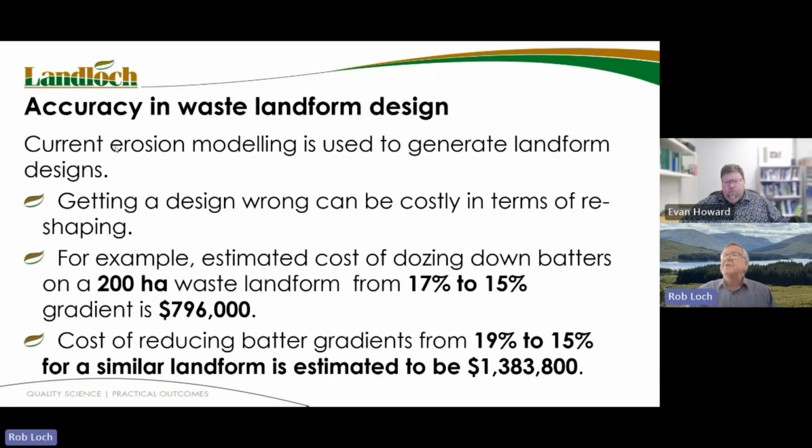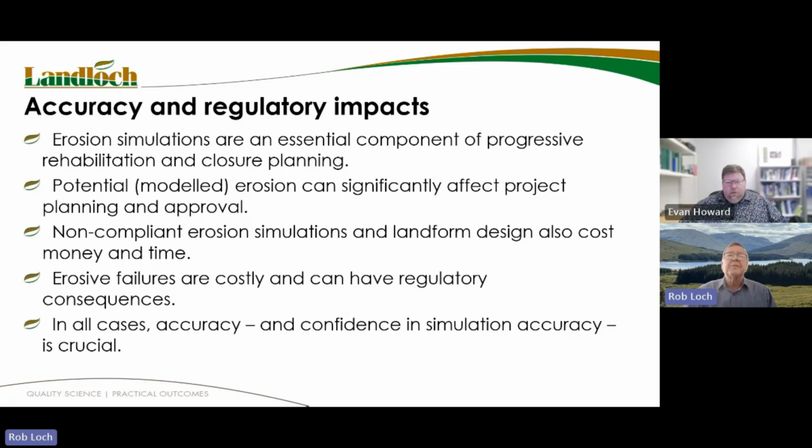So the point here is that design and finalisation of a landform for rehabilitation does involve extensive and expensive placement and shaping of materials. And I suppose at that point, I'd also add a couple of comments. In my experience in Western Australia, there are some examples where the cost of dozing down and reshaping is in the order of 80% of the total rehab cost for a site.